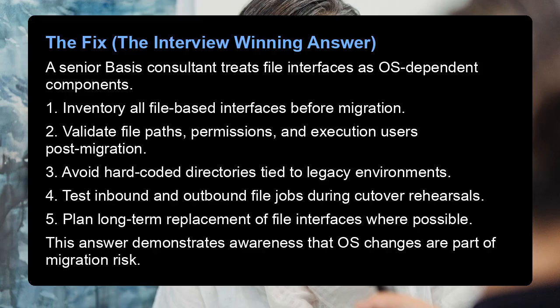3. Avoid hard-coded directories tied to legacy environments. 4. Test inbound and outbound file jobs during cutover rehearsals. 5. Plan long-term replacement of file interfaces where possible. This answer demonstrates awareness that OS changes are part of migration risk.